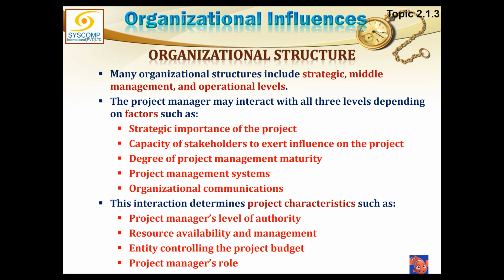Now, once these functional areas are there, my question comes in. There is a project that comes in, which is probably manufacturing of aircraft X, and then manufacturing of aircraft Y. You dedicate a project manager for project X, and you dedicate a project manager for project Y. Both have to make use of these functional resources. They will all be using the same resources, same specialty, same die and everything. So that would be a strong matrix kind of position.